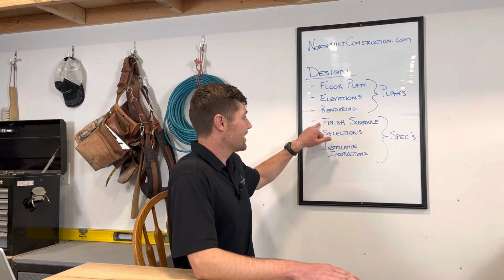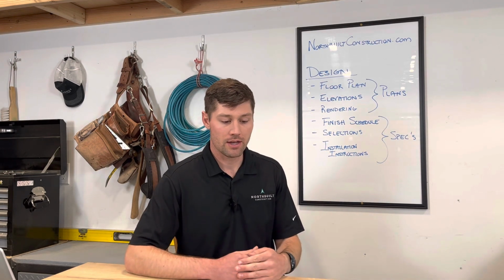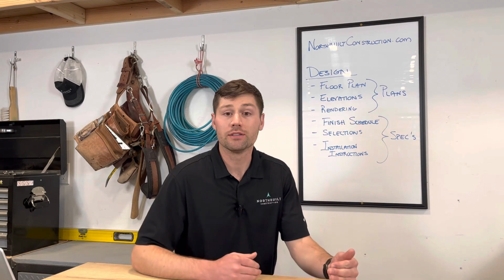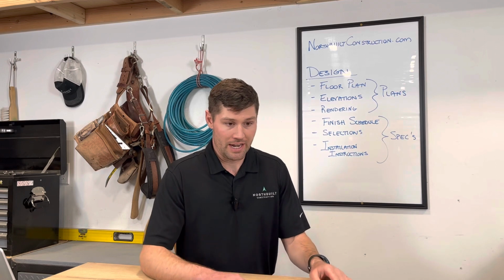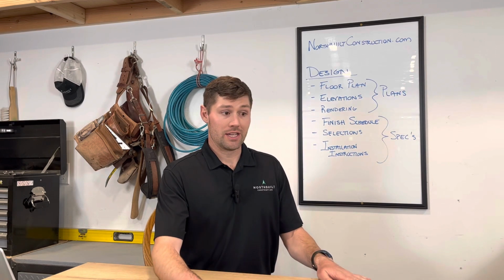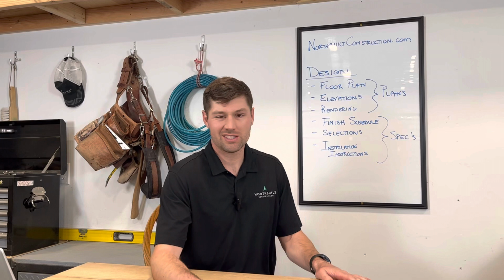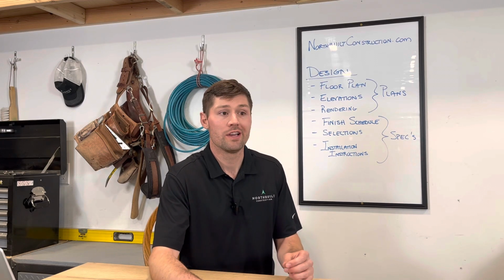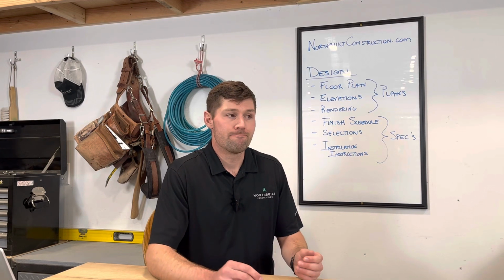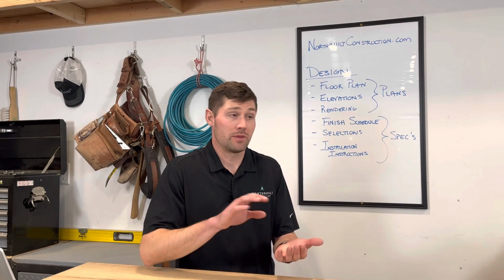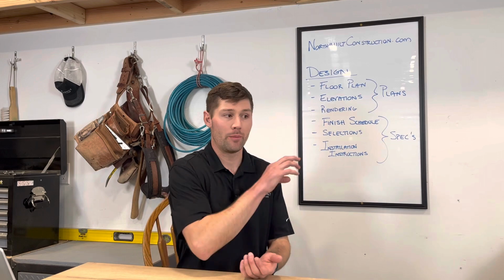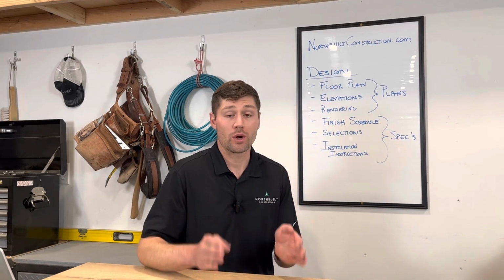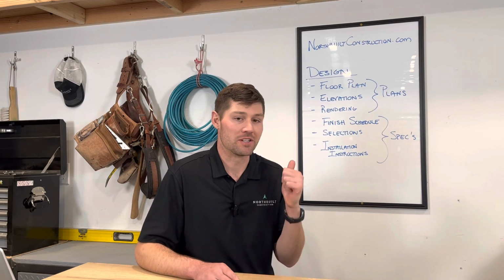Finish schedule. That is essentially an Excel sheet or a list of all of the finishes, and it'll just break it all down. It's not that exciting, to be honest, but it's critical in the proposal phase, knowing exactly what we're going to put in there, what they cost, and helping us derive the price for the remodel or the project that you've got under design.